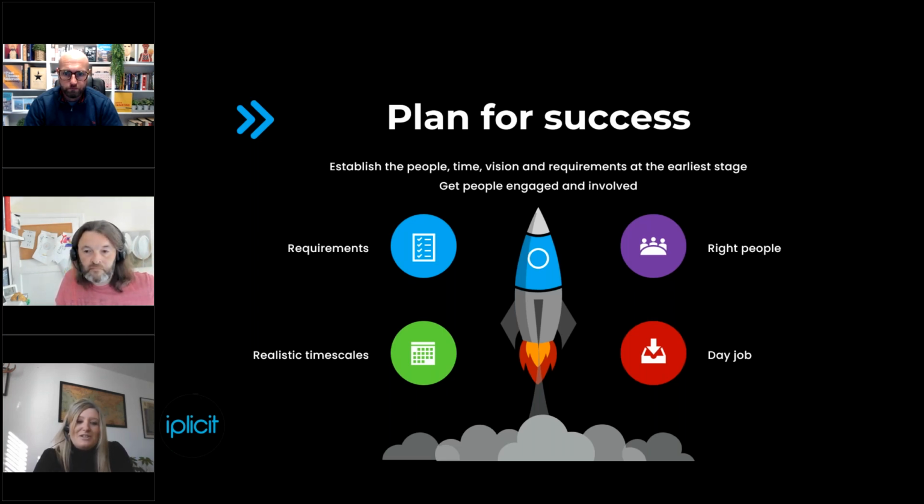And there's usually takeaway points that you and your staff need to go away and do, complete, think about before the next session. And again, you shouldn't just plan for being in front of us and being in front of a trainer, but actually add on a little bit of extra time after each session for those tasks, because if you can get that done whilst everything's clear in your head, it's much easier to go into the next session having completed your homework.